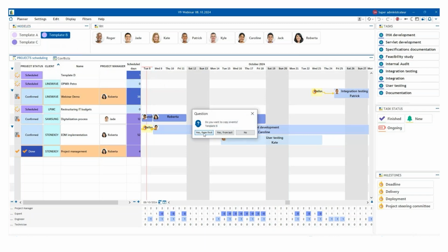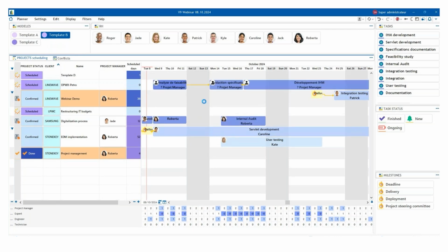for my new project, and I have the choice whether to start my scheduling from this date that I have selected on the planner, or to stop it there. So it's like a retro scheduling method. So let's say that I would like it to start from here. In this case the template came with the different tasks that I would like to manage, but also for some of these tasks brought by the template, we have some employees that have been automatically assigned.